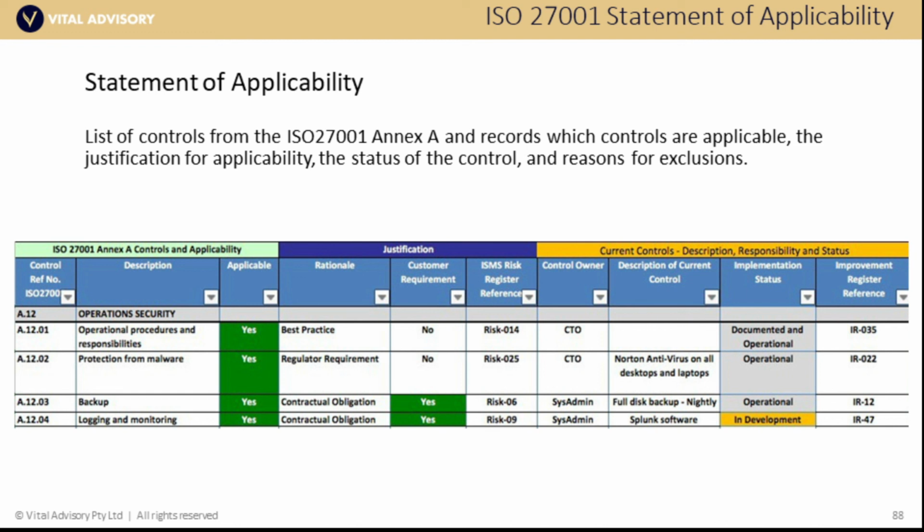Yeah, and you might have a multi-stage treatment plan. That's definitely what I've seen. I had one client who was required by contract to have data loss prevention. They couldn't do it, but what they did do was implement some fairly basic things early. And so their treatment plan was three-staged. And they said, we'll arrive at the acceptable level of risk in about 2 years' time, mainly for reasons of budget. That the full rollout of this was going to be arduous. So they just stepped through, the minimal and the most risky part first, and then built on it over time until they finally got to that state. And they kept a watching view on that.